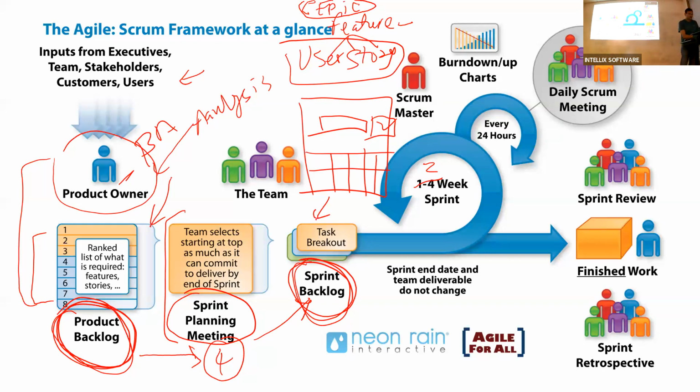So they will document all these components in the tool. It's called different tasks, development tasks. Okay, you as a QA will not do any development, but the development team will come up with the task breakup. That's the terminology here, task breakup. It's based on the design. They will document what we need to build from the back end so that we can implement this feature or functionality. Okay, so that's the task breakup. And I'll show you where they document it in the tool so that you understand.